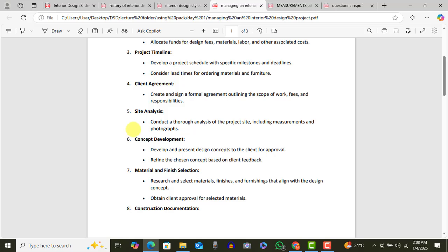Exactly. So what kind of time can we do this? So you have to do a full site analysis. Go there, have a plan. For this thing, when we bring it, this is where we pass. This one, this is how we have to go about it. This one, we have to rent scaffold. This one, we have to do this. You need to do a full analysis and jot some few points down so that you don't get caught off guard.